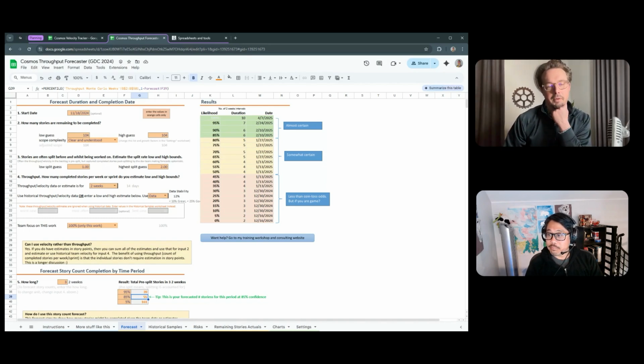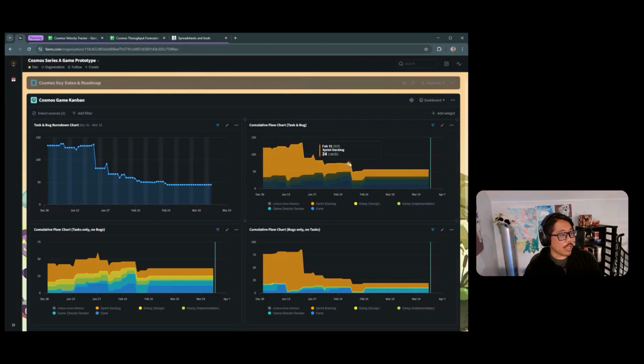This is awesome. And if I'm not mistaken from this, you're really looking at how many cards you're completing. You're actually not using story points or any other type of estimate like that. Yes. I have run these kinds of forecasting systems using both card counts as well as story point estimates. They both work. The forecaster doesn't care whether it's a card count or story points; a throughput number is a throughput number.